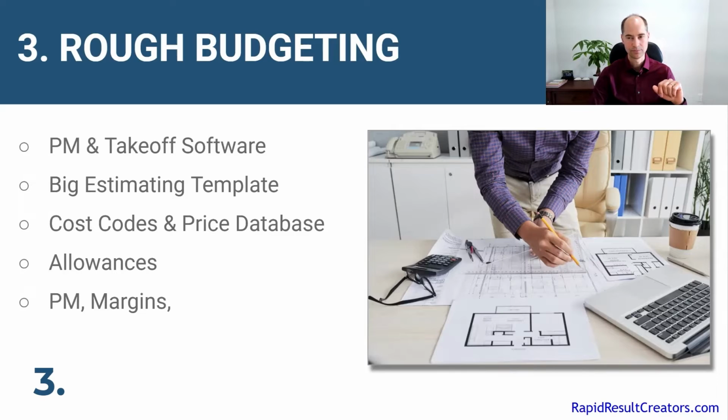One thing that a lot of builders, and especially newer ones, forget is you want to make sure you have project management time in your estimate. And it should be very clear. I like to have it right in there so the client can see it. Some people are like, I don't want to have management time because other builders don't, and the client's going to wonder why they're getting charged for this.